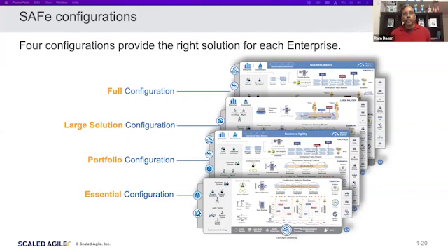There's a lean business case created on those, and then these epics get decomposed into features, which go into the ART backlog, and eventually get decomposed into stories, which go into the team backlog. And the stories get executed by the teams. They implement the value or the code into staging and production. They will be demoing it, getting the feedback, and then reapplying it. And finally, they release that value to the end customer.